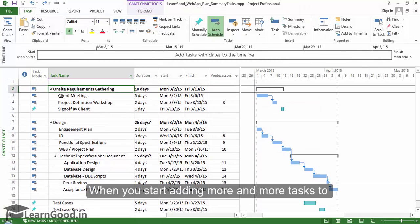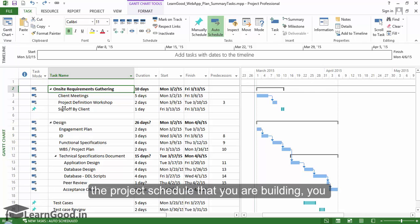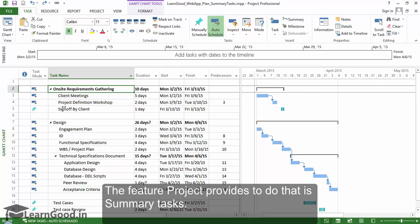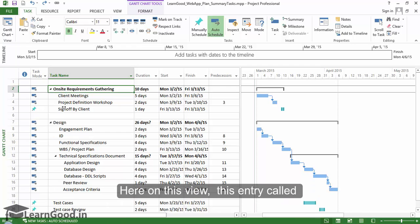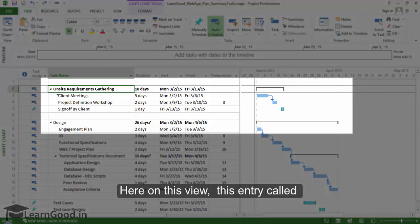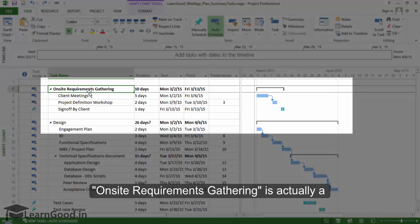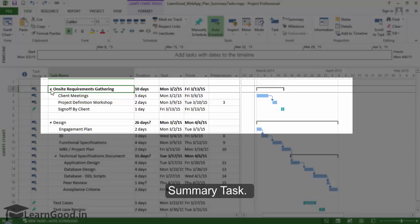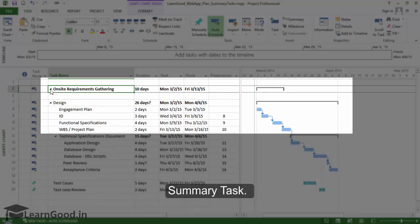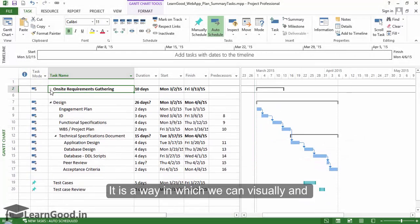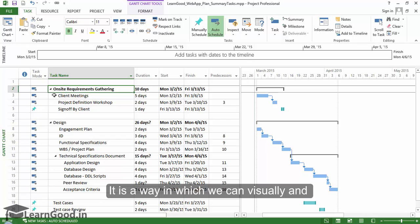When you start adding more and more tasks to the project schedule you're building, you will need some way to organize your tasks. The feature Project provides to do that is summary tasks. Here on this view, this entry called on-site requirements gathering is actually a summary task. It is a way in which we can visually and logically group the next few tasks together.